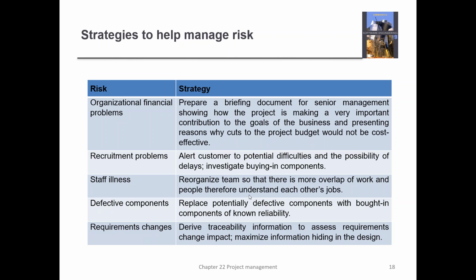You might need to modify them somehow. So, organizational financial problems: prepare a briefing document for senior management showing how the project is making a very important contribution to the goals of the business and presenting reasons why cuts to the project budget would not be cost effective.